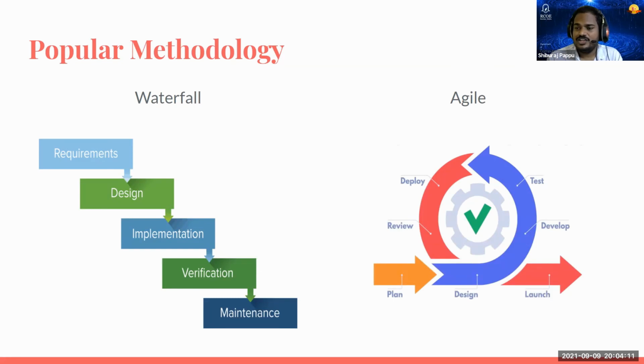So it is like a continuous process. It is not like you start the project and only after everything is finished I will show you the project. That is not how it works, that is waterfall. So in agile, what happens is you divide the project into small parts, complete one part, show it to the customer, then start the next part. It is possible that you start with multiple small parts together, but the point here is you have to work in small parts. Okay, so let us look at the things.